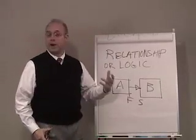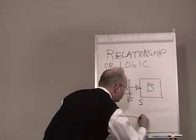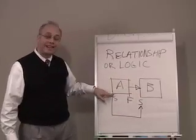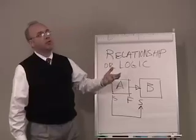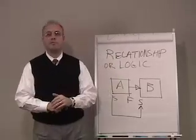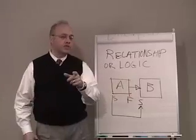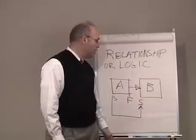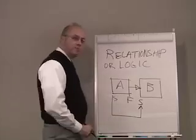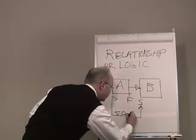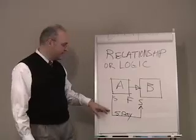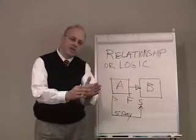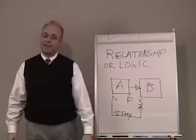Another kind of relationship is a start-to-start relationship, where activity B can't start until after activity A starts. For example, we might say we can't start roughing in mechanicals and electricals until after the metal stud rough-in begins. Sometimes we'll put a lag between those starts — say five days — meaning the start of activity B will lag the start of activity A by five days. That lag represents the amount of time we wait between the start of one activity and the next.